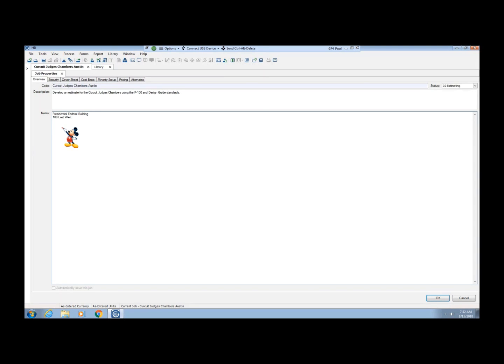We'll put in the building that the project is in, the building's address, what drawings were used, whether it was a sketch or construction drawings or design drawings, and what stage it was done. We'll note whether we got a chance to do a site visit or not. We'll put in a note on whether there's demolition in the project, complete demolition, partial, select, that kind of thing.